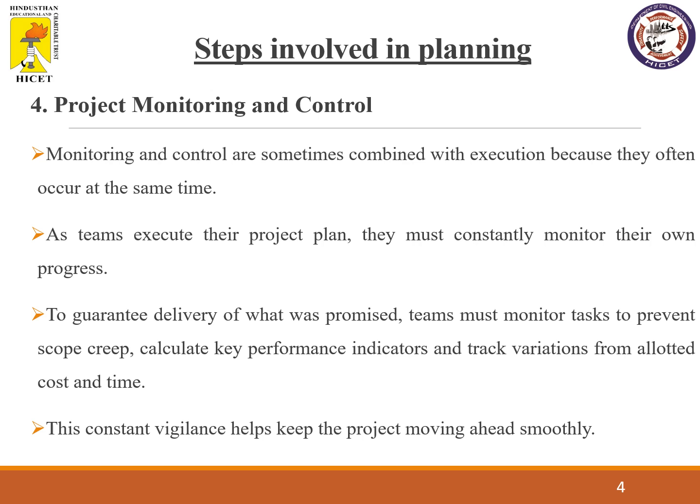The next step in our planning will be project monitoring and control. Actually, project monitoring and control is almost combined with our execution phase, because when you are executing a project, at that phase only, you will be able to monitor and control the project. Right? While your project is going on, you have to check whether it is according to the time frame which has been planned, whether the resources are properly being used, whether they are being underutilized or overutilized, whether the labor force is correct in terms of numbers and quality. Everything has to be checked. So for this, we have a team who will execute and continuously monitor their own progress.